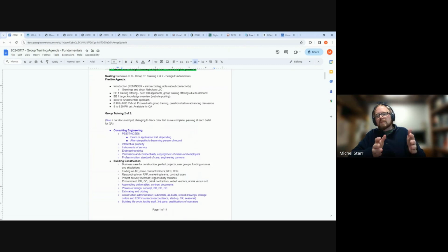But then there tends to be, compared to what ordinarily would have been a design-bid-build approach where everybody understood their roles and expectations, miscommunication. Responsibility matrices really help with that, to say who's going to deliver what and who's responsible for which, and the like.